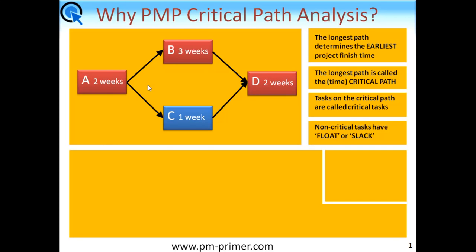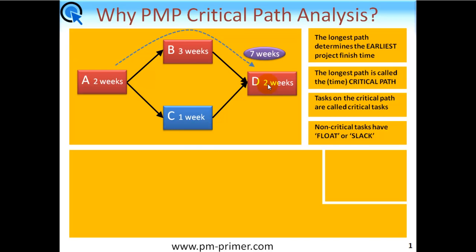Which leaves Tasks B and C in parallel in the middle. Clearly, B is the longer of the two at three weeks, and C is only one week. So you'd be absolutely correct if you said that the critical path is Task A, B, and D. If we add those up, we can see the earliest finish time based on that longest path gives us seven weeks.